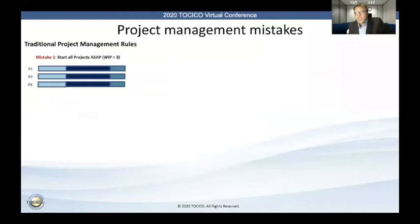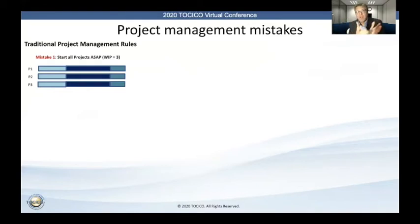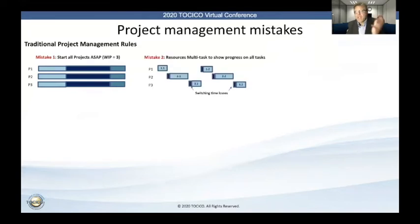So first, just briefly covering the rules. For me, the logistical solutions of Theory of Constraints are all just simple heuristics — simple rules, each designed to prevent common decision mistakes. The first mistake noticed here was that as there were delays, they were starting all their programs, projects, and phases as soon as possible. A practical example: we're going to have work in process of three at any point in time. That has consequences because everything will take longer and we'll get much less done.